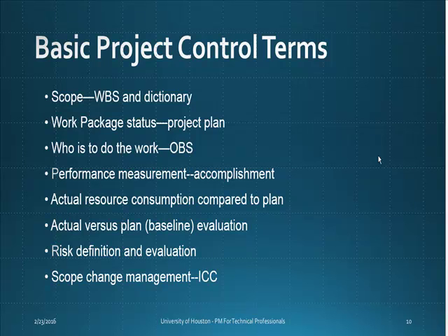And for the work package status, if we see the WBS as a hierarchical breakdown structure, and you know the work package status, if you roll them up, then you probably know how your project is working, and you can benchmark against the original plan that you set up in the planning phases of project management. And if you want to identify who's doing the work, you can go into your organizational breakdown structure, which is connected to the WBS.